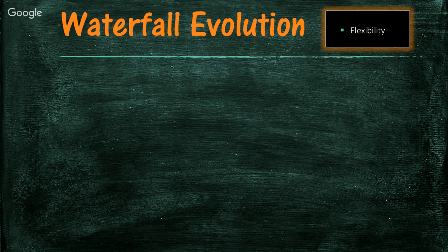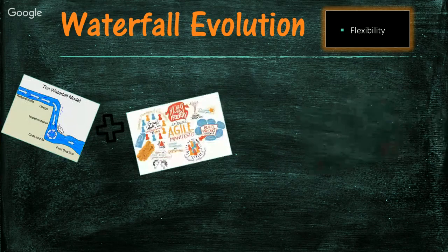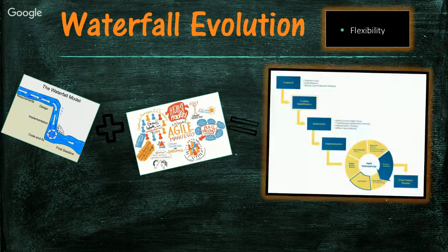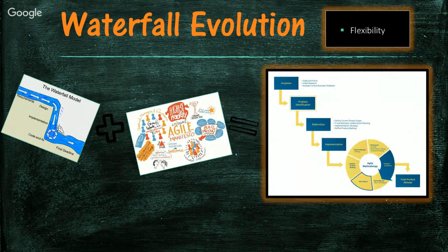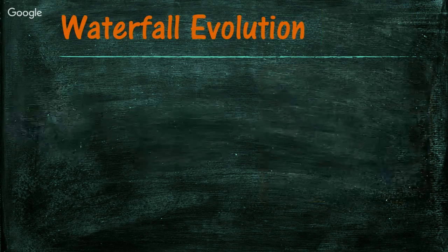The hybrid system, or collaborative model, uses the pros of both Agile and waterfall models. How, you might be wondering? The hybrid model uses waterfall methodology primarily during the requirements and analysis and design lifecycle phases, and then it incorporates the Agile methodology into the coding, test, and implementation phases. So, let's take a look at how this might work out in a case study.